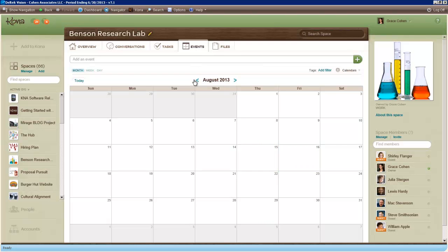So let me just look into the future here to get a little visibility into some of the events. If you have a number of different drawing packages going out, a number of different meetings, a number of different review sessions all occurring quite rapidly in your project's timeline, you can get a full pictorial view into where the bottlenecks exist. If I saw that I had 16 different things all happening on June 3rd here, I would know that there might be a resource constraint. There might be an issue within my project to get everything done according to that deadline.